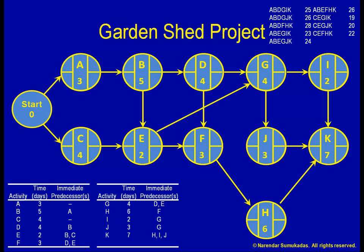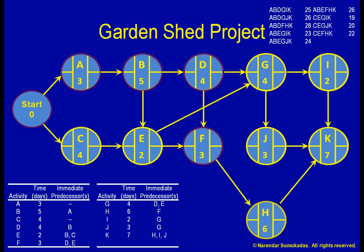Comparing all these totals, we take the longest path, A, B, D, F, H, K, to be the critical path. The project duration will be the length of the critical path, or 28 days.